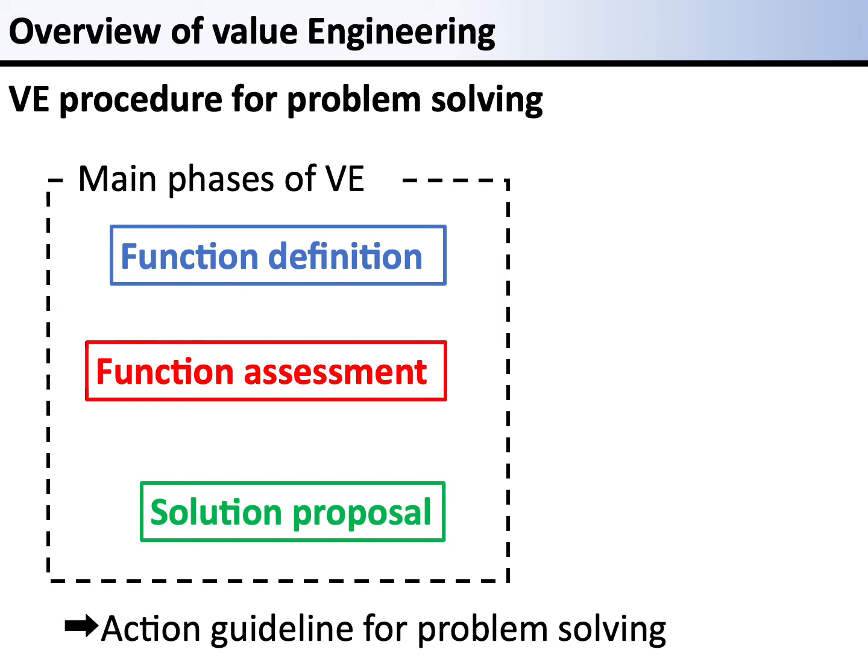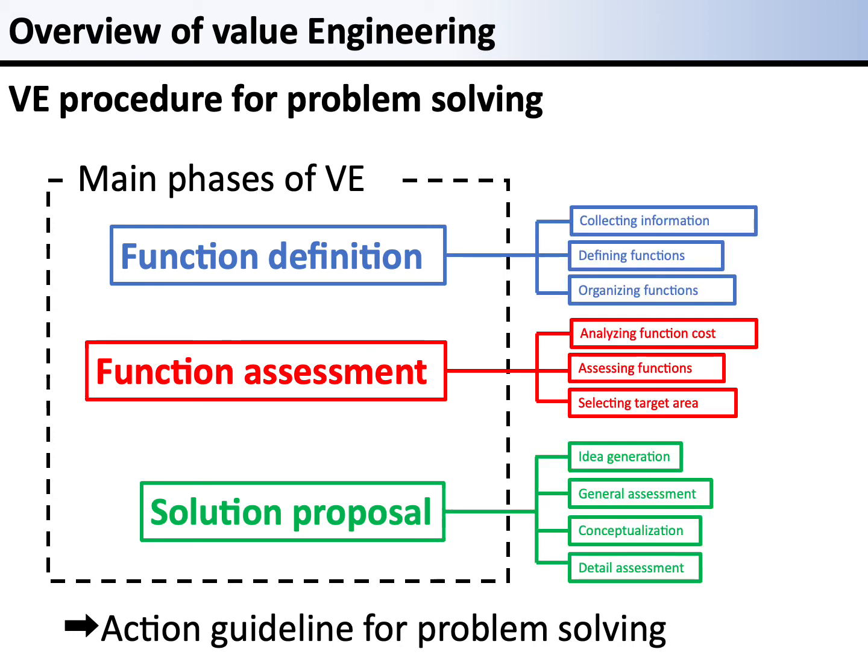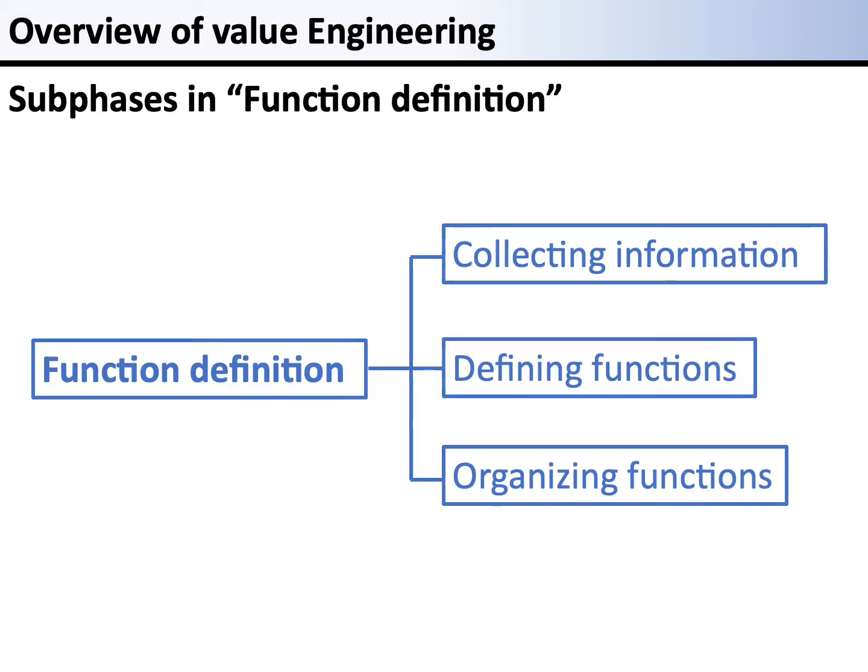The procedure consists of three main phases: function definition, function assessment, and solution proposal. Each step is composed of more detailed subphases. The phase of function definition is composed of three subphases: collecting information, defining functions, and organizing functions.